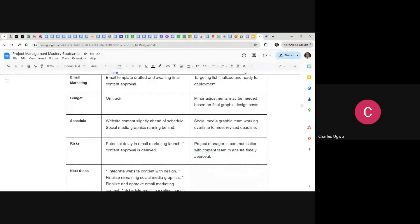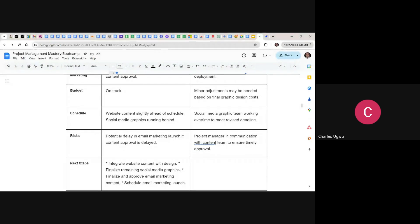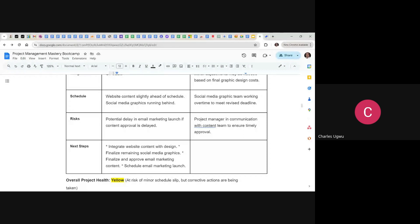Schedule — website content is slightly ahead of schedule; social media graphics are running behind, with the team working overtime to meet the revised deadline. Under issues: potential delay in email marketing launch if content approval is delayed. Project manager is in communication with the content team to ensure timely approval. Any risk or issue you mention, you equally talk about the mitigation plan.